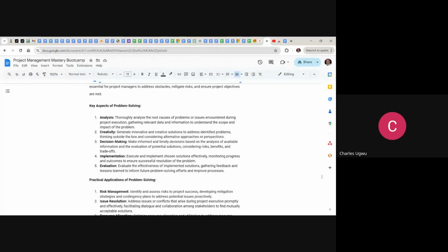So if you are assigning a problem to an owner, it must be time-based. And as soon as the time elapses and it is not solved, it has to be triggered. It has to be escalated to the next line manager or superior officer to handle that. So you should be able to take timely and prompt decisions. It is very, very key as a project manager.